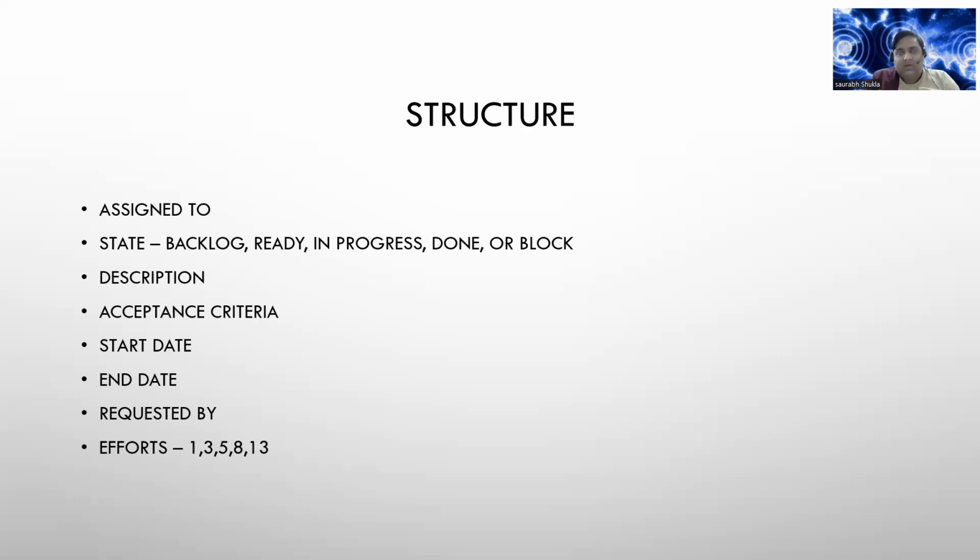Okay, 5. I am just telling you as per the complexity. If you have to give access so that he can change the data as well, 8. 13, he can create an entirely new database. He can create a new table in it. He can do a lot of things. Upon the complexity, and this might not be complex work, but upon the complexity, you can decide the effort, what weightage you can give to that user story.